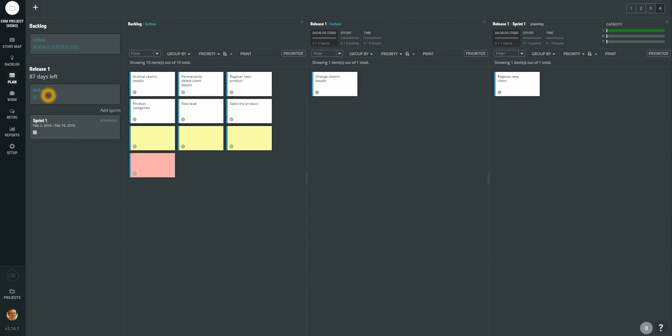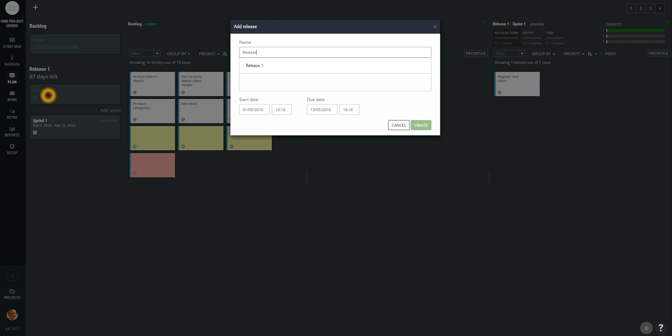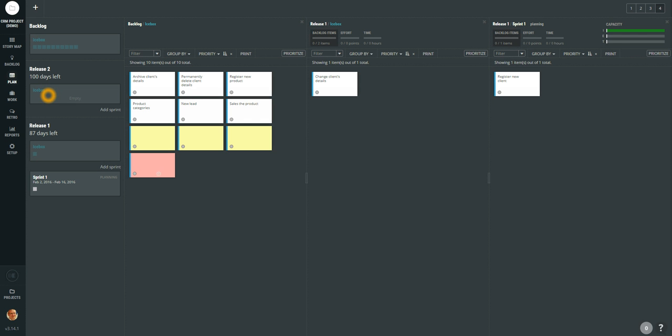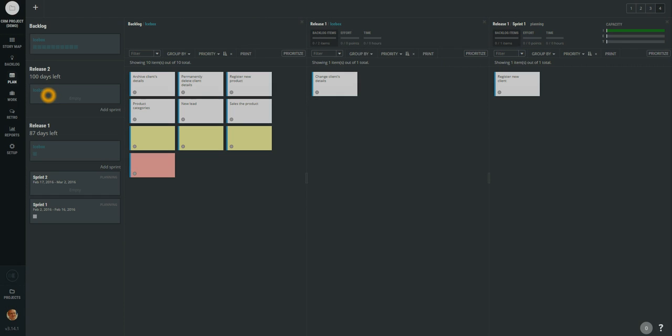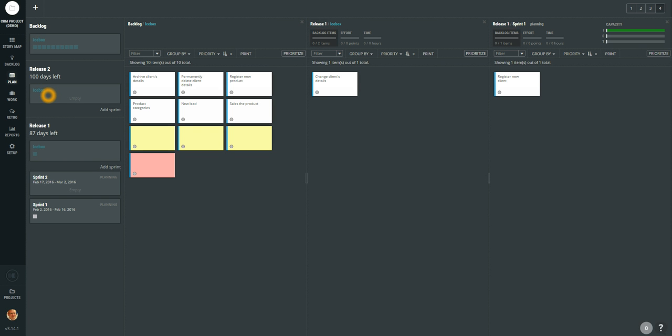Some product owners even prefer to plan two releases at the same time. One release which is far in the future, and another release which is the current release and the current sprint. And some even prefer to plan even the next sprint at the same time. So that way you can have the possibility to plan the current sprint, the one sprint ahead which is very short term, maybe the current release which might be the mid term, and also to plan your long term for the next release and also for the product backlog.